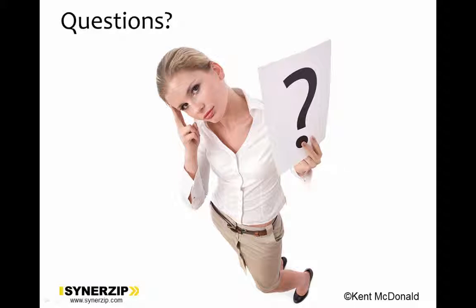And so we asked, what's the minimum viable thing we need to have by December 1st to keep moving forward? At that point we needed something that could accept submissions and something that could allow people to start reviewing them. We used that as our decision filter that helped us say, okay, here's the stuff we're going to bring in, here's the stuff we are not going to worry about right now. At that point we didn't have a good feel for how much we could get done, although Brandon and Darren had worked quite a while together, so they kind of had a feel for it.